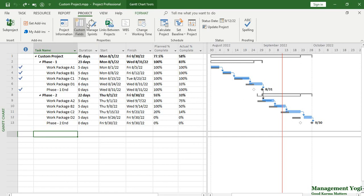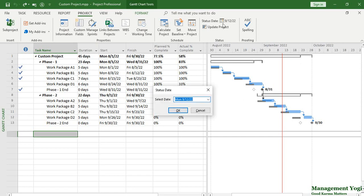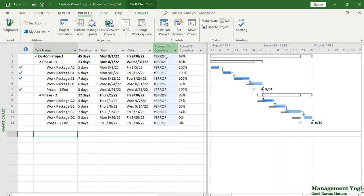I'm going to go to the Project tab, under the Status group, and execute the Status Date command. Currently this is populated — I'm going to set it to NA, meaning not applicable. Now when I do that, as you can see, error notifications are appearing in the plan percent complete field. The reason is that inside our formula we have referenced the status date built-in MS Project field, so if you have not set the status date properly, you will get error notifications. Now I'm going to revert by doing undo to go back to the original state.